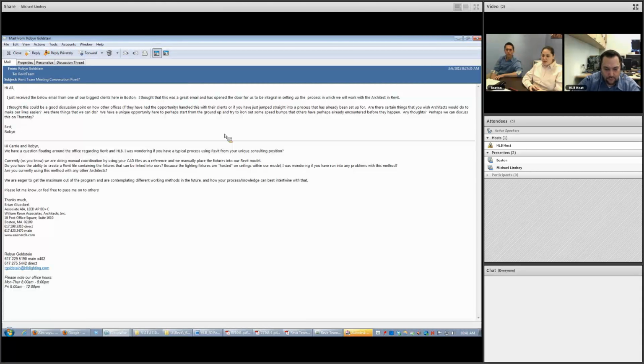For instance, Gary dropped out a line about clash detection, like it was a normal service that we could do for no additional fee, and it was so easy, and it just happened as part of Revit. And we quickly jumped on that, and said, no, clash detection is an additional service. Just so that stuff like that is made clear to them, because they're not working in this on a daily basis. They don't know, does something take 5 minutes or is something going to take you a week, and we need to get some more money for this.